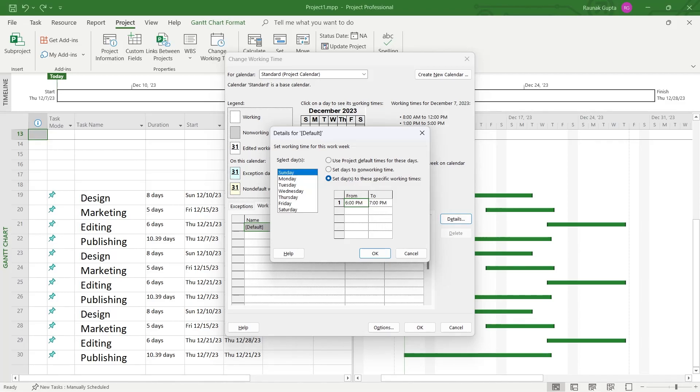So I'm selecting Sunday and here you can enter the time for that Sunday and make sure this one is selected to set days to these specific working times if you want to specify a working time. Click on OK after doing all these.